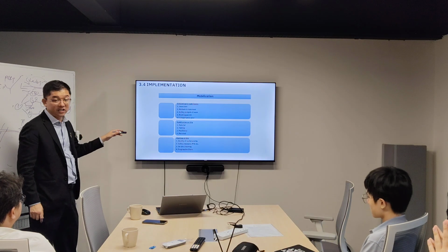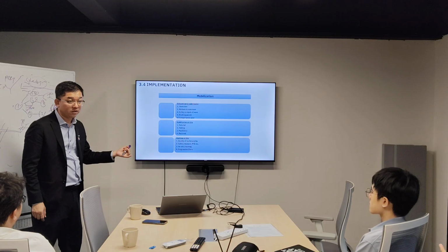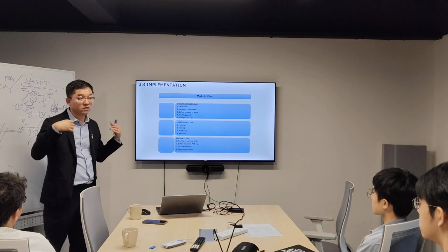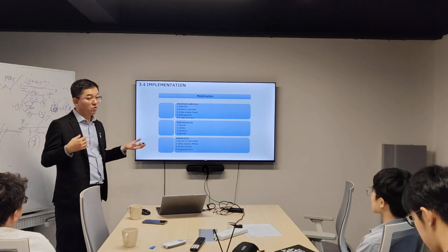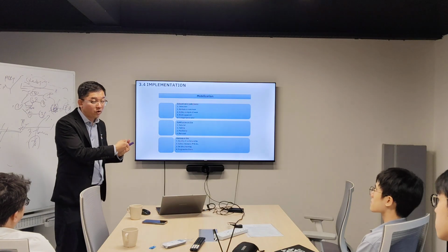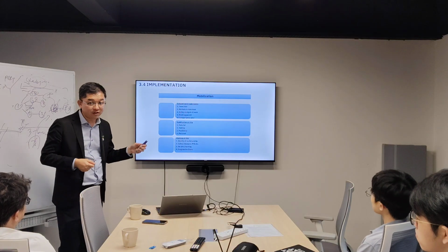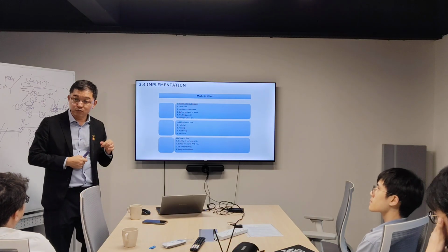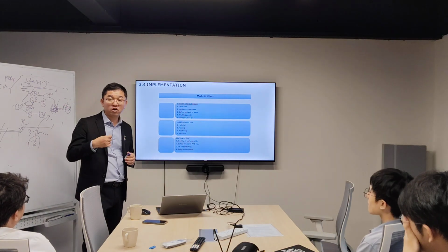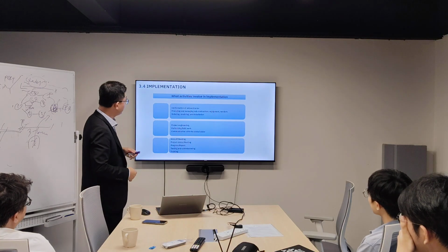For the working site, what they need to do is ensure the quality of the workmanship. Of course, they need to have a QC manager, they need to wear the safety PPE, and they need to have the consultant to support, inspect and approve everything. Then of course, related to money, the contractor needs to submit a progress claim. Then let the consultant or the client approve, then they can only claim for money. This is during implementation. Okay.